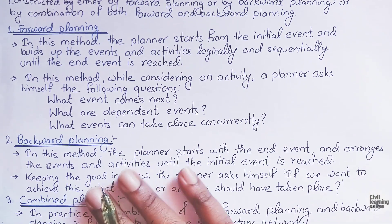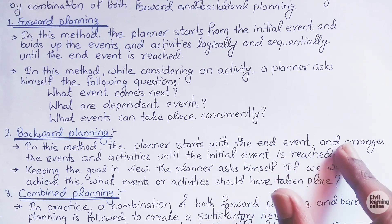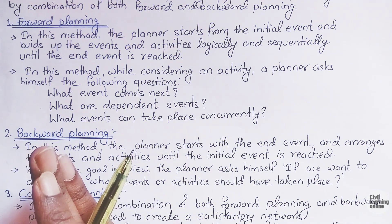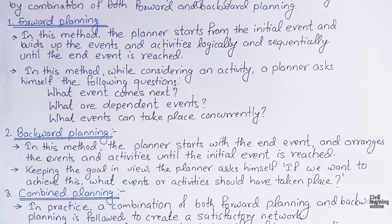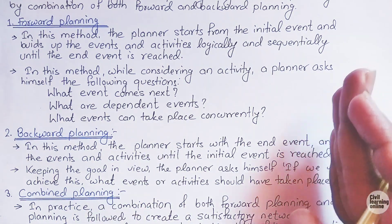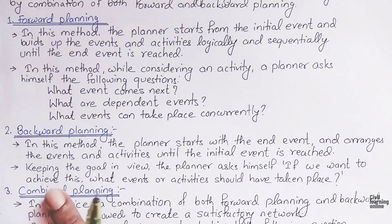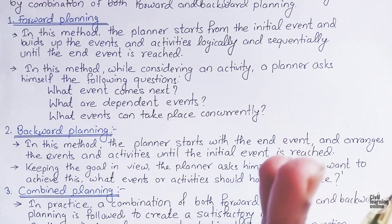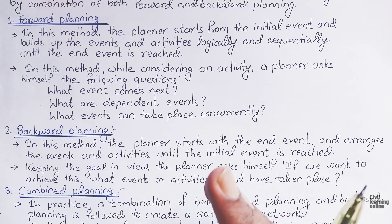The second type of planning is backward planning. In this method the planner starts with the end event and arranges events and activities until the initial event is reached — it is exactly opposite to forward planning. Keeping the goal in view, the planner asks: to achieve this goal, what events and activities should have taken place? For example, if we plan to build a house, we imagine what activities are needed and prepare a network accordingly.